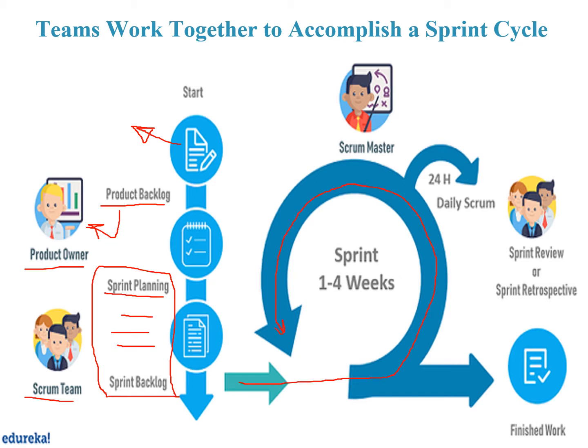So when we reach here, we go to the first sprint, and the sprint is 1 to 4 weeks, or 2 to 4 weeks. Normally it is not less than 1 week if it is normal software. If it is just some simple development, or improving or adding features, then maybe we have 1 week or less.